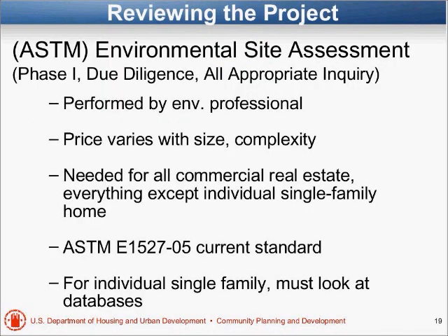Okay, I want to talk now about some of the ticket items, some of the components of environmental review, just to give you a flavor of what might happen in your environmental review. One of the most prominent things now is what we call site contamination, and you'll get what is commonly referred to as a Phase 1 environmental site assessment that's prepared according to the American Society for Testing and Materials protocols.